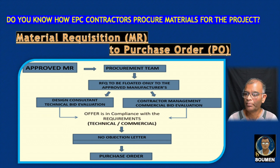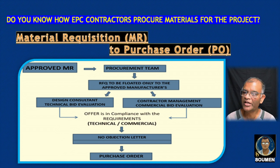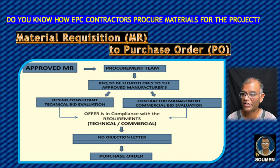The approved MR first goes to the procurement team, who sends a Request for Quotation (RFQ). For example, to procure a flange, we look at the regulated vendor list for approved vendors. The RFQ is floated only to approved manufacturers, who send back quotations. The design consultant checks the technical portion and contractor management checks the commercial bid evaluation. Both technical and commercial aspects must agree on one vendor, and then a no-objection letter is issued. The contractor submits this letter to the company, and accordingly the purchase order is finalized.